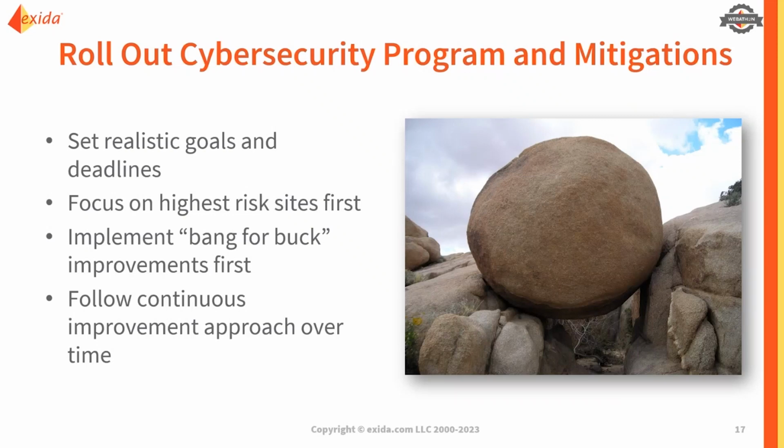and then look at having a continuous improvement approach for more invasive countermeasures that may have a potential impact on availability or may require system downtime to implement. So we can always think about what can we do now to reduce the risk, and then what's our plan for implementing additional controls that are required over time.